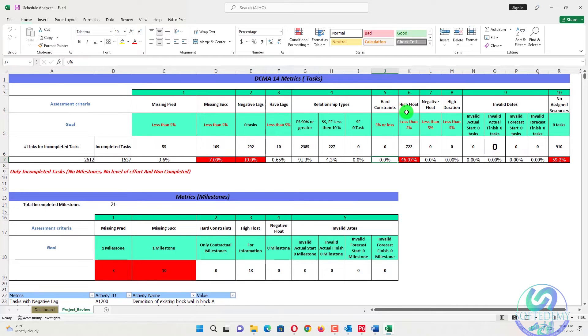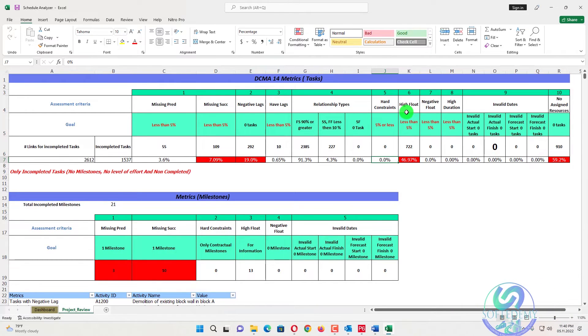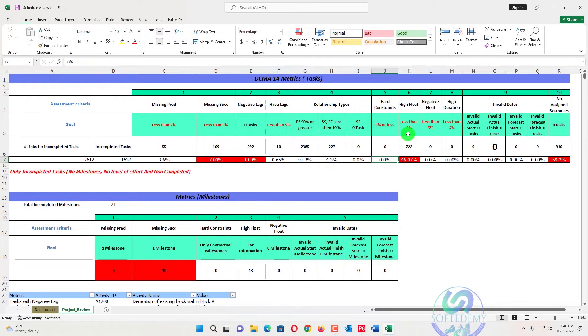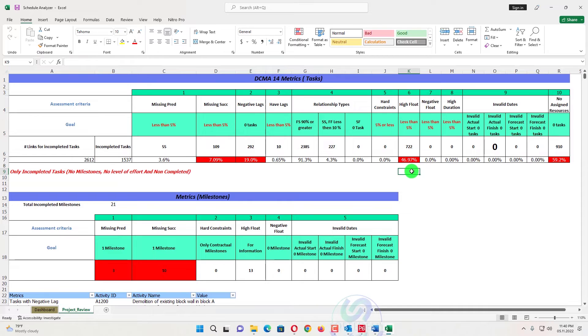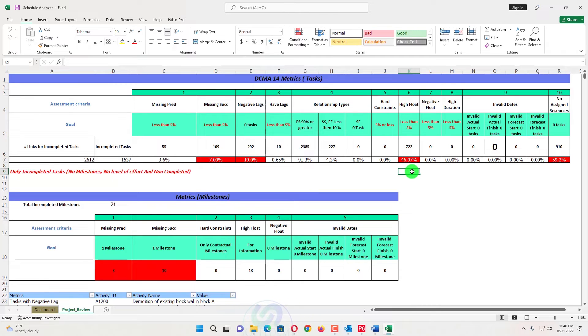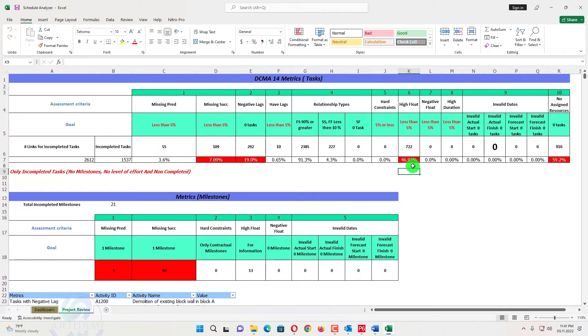What about higher float? Higher float means your activities do not have a complete float or do not have a complete path. For example, you have left an activity before four months. So you haven't connected that activity to the relevant relationship. So that's why that should be 5%. And here it's 46.97%. So your maximum activities are on higher float. Higher float, it's not acceptable or it reduces the chances to be monitoring as an actual delay. So if you have a higher float, you cannot monitor your schedule on the base of critical path. Because whenever you update, the float will be reduced, reduced, reduced, reduced every time. And to come up with a zero float, it's very difficult to monitor that critical activities.